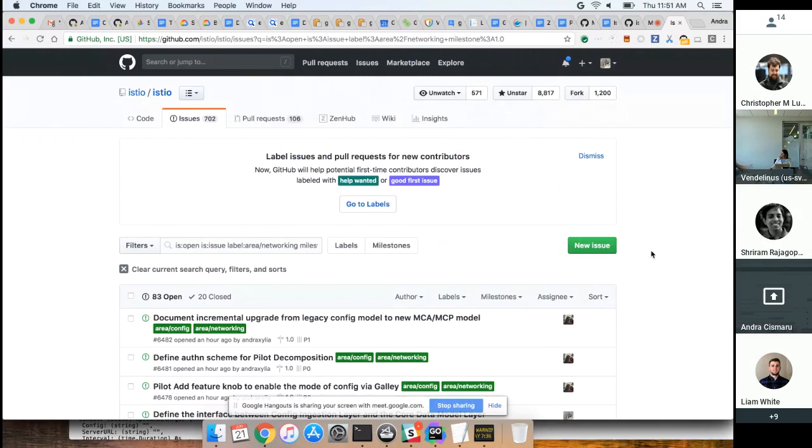And then once the bug has a real assignee, it's their responsibility to maintain the bug. The stale bot will prod them. If a bug is unassigned, then it needs to be triaged again, or it's marked as help wanted, and then it can stay unassigned. We don't have all that automation in place right now, but we're trying to start adding some of it. Yeah, it's useful to have. Oh, sorry, go ahead, Christopher.